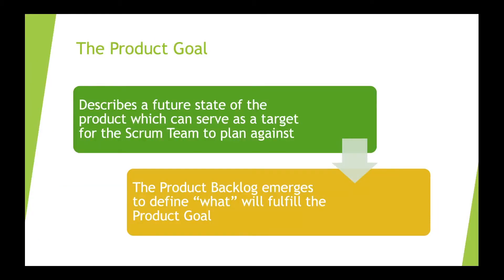The product goal provides context to the product backlog, describes a future state of the product, and serves as a long-term target for the Scrum team to plan against. There is only one product goal for the product backlog at any one time. The Scrum guide is intentionally general about the product goal, allowing Scrum teams to structure the goal in a way that most effectively works for their team. For example, one team might work best with product goals that are very specific and align with quarterly objectives, while another might work best with higher-level product goals. The product goal is added to the product backlog, then the remaining product backlog items emerge to fulfill it.